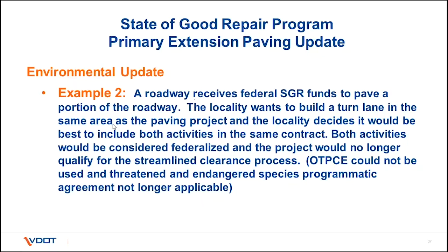If there was a question in the chat in regards to localities, VDOT charging to the project, the answer to that question is yes. VDOT will be charging to your project for not only VDOT oversight, but also if we complete the NEPA on your behalf.